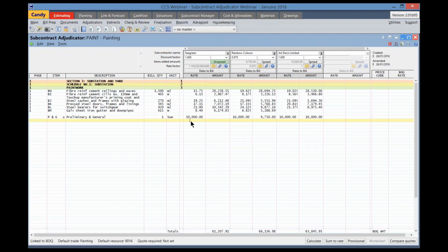If a bill item does not have a worksheet, then one will be created automatically using the item's price code. If there is no price code, but the item has a trade code, then the trade code would be used to create the system-generated price code. If the package has a default trade, then that trade would be used to make the price code.